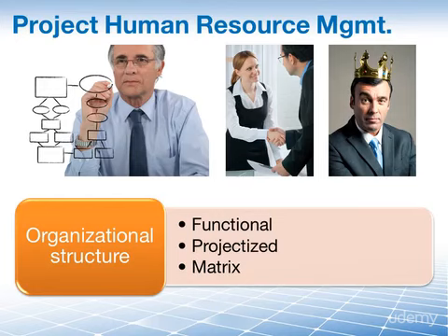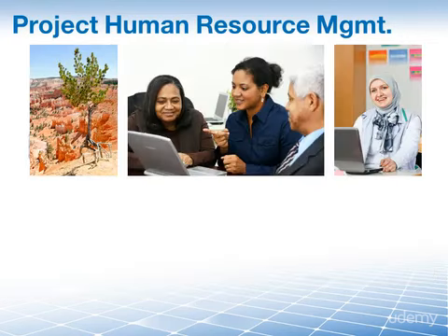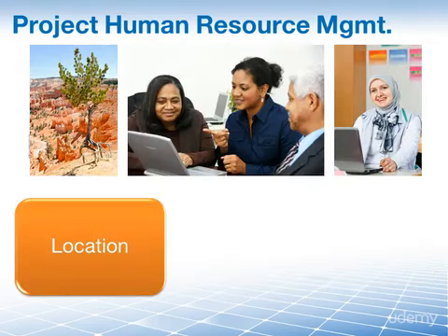However, if on the other hand you are in a projectized organization, then you, so to speak, are the king or the queen of your project. You will be the man or woman who's going to set the hiring strategy and make the hiring decisions for the project. And lastly, location.